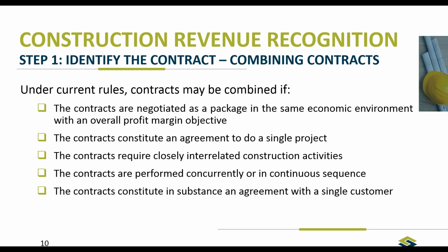The contracts constitute an agreement to do a single project. The contracts require closely interrelated construction activities. The contracts are performed concurrently or in continuous sequence. The contracts constitute, in substance, an agreement with a single customer.